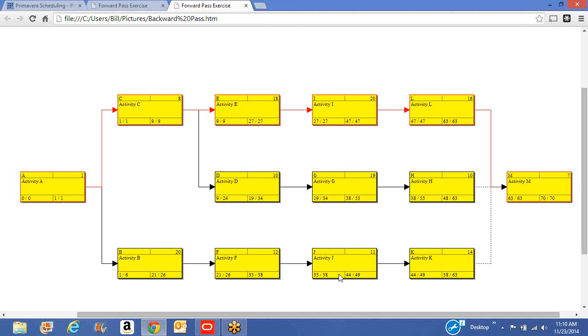As you can imagine, there are complications when you're using, say, a start-to-start relationship or a finish-to-finish relationship, because all of these are drawn, as you can see, as finish-to-start. And calendars can certainly make a difference. If not all of the activities share the same calendar, that can certainly make the float calculations a bit different, because float is determined by the activity calendar.